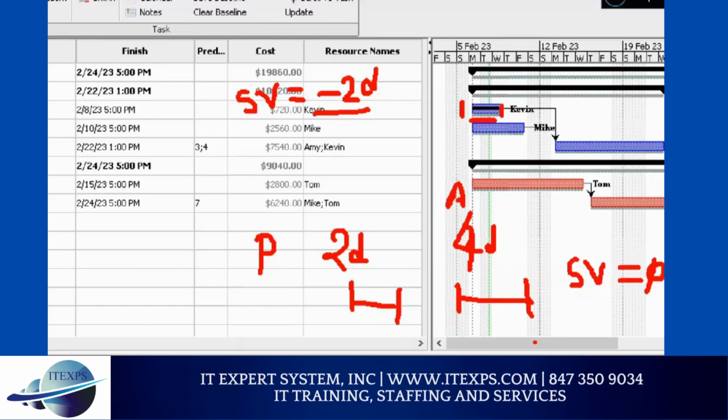Very simple. Almost every interview I ask this thing. How would you monitor project success? The correct answer is variance. Because what you plan and what you execute, what is the actual? Plan versus actual. If plan and actuals are both identical, then variance is 0. Variance 0, no problem. Variance positive is no problem. But variance negative is a problem.